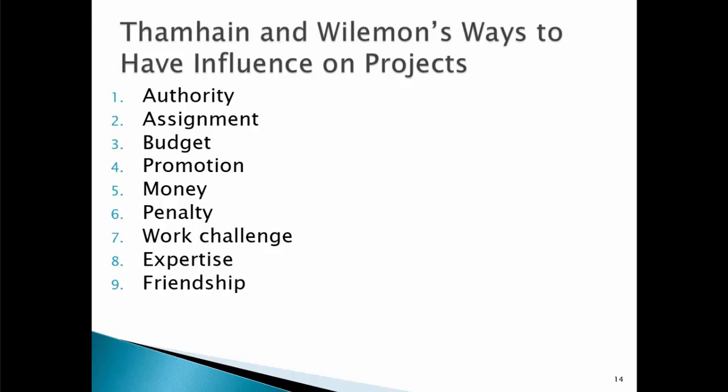Projects are most likely to succeed when project managers influence people using expertise and work challenge, while projects are more likely to fail when project managers rely too heavily on authority, money, and penalty.